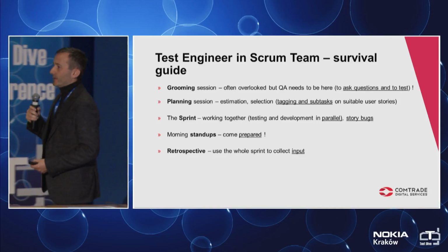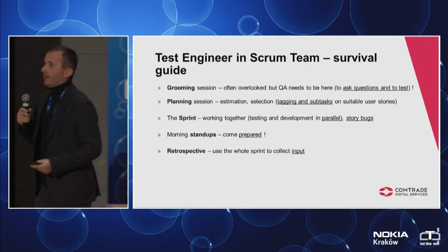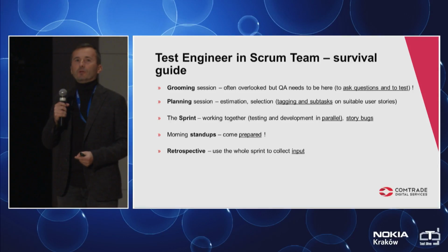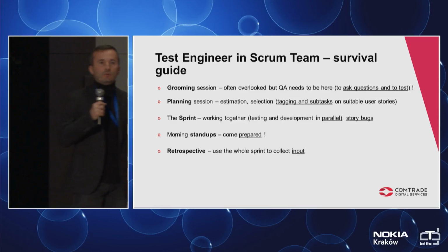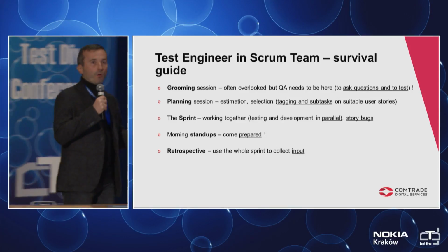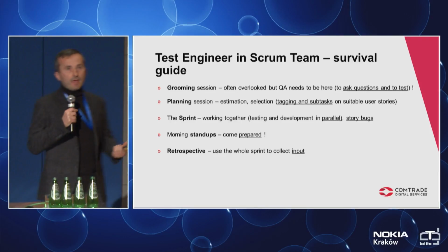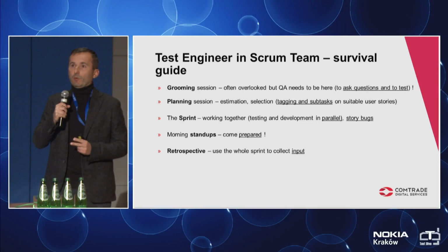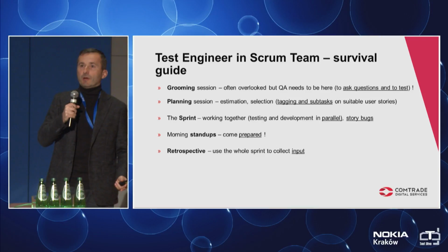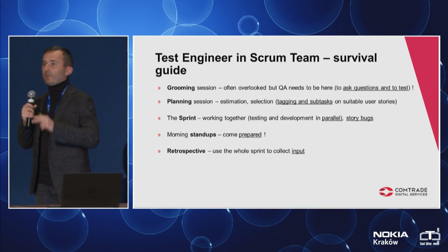Morning stand-ups. I think Rex already mentioned that. It's very easy to lose precious time on the morning stand-ups. There are only 3 questions you need to answer on morning stand-ups. What did you do yesterday? What are you planning to do today? Do you have any problems? It's okay to have questions, but only people who are involved in that communication should stay after the morning scrum. Everybody else is free to go. So don't waste time.